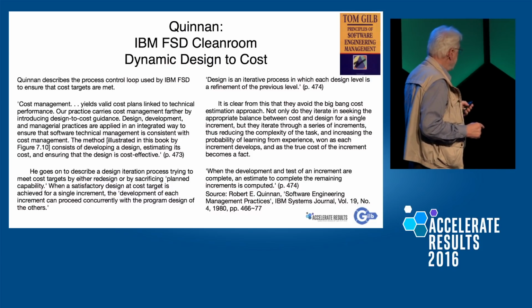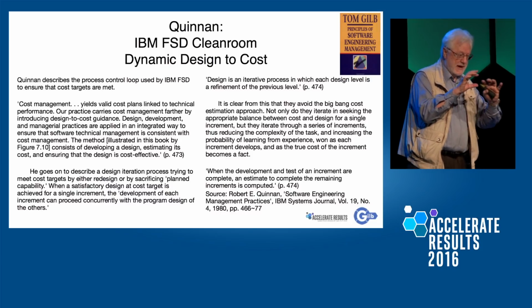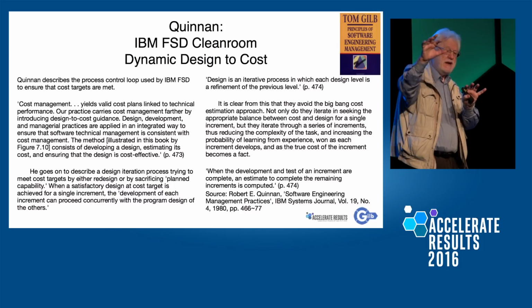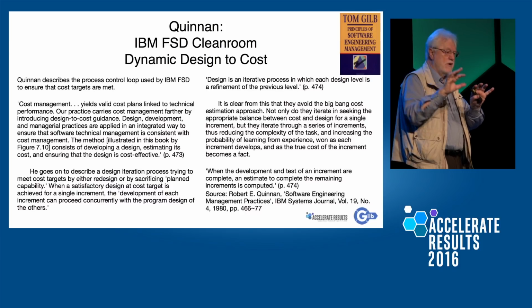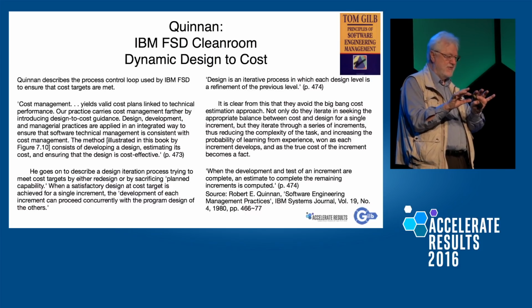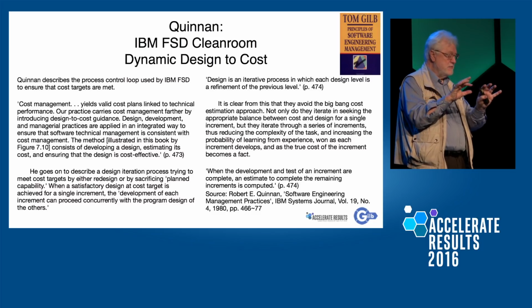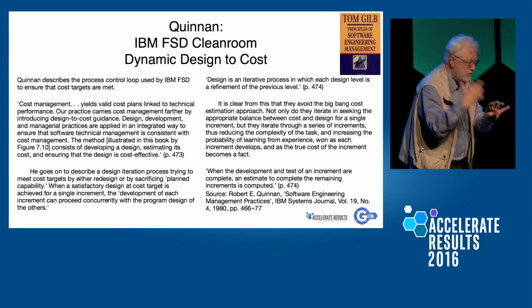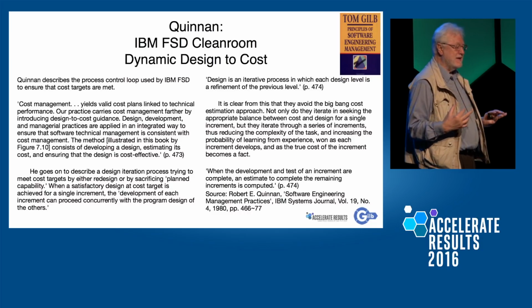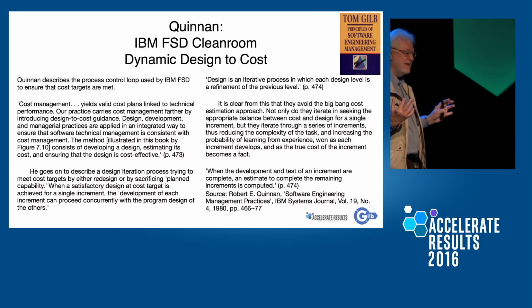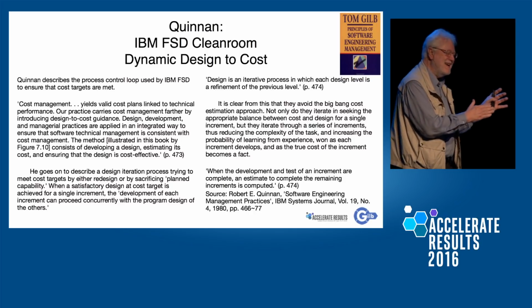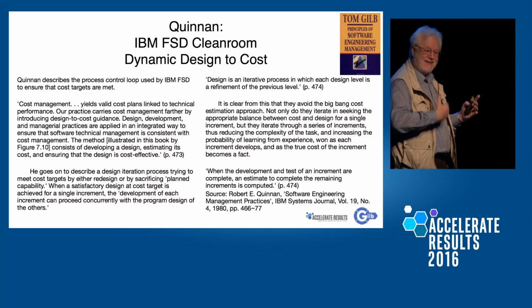dives in there and says, let's measure how much availability we got. We're charged with 99.98% availability. We're at 99.90, not good enough. So the architecture isn't there for getting to where we need to. What architecture should we change now and measure on cycle 3 that tells us maybe we got to 99.98? See the reasoning process? This is not architecture up front. This is architecture in the middle.